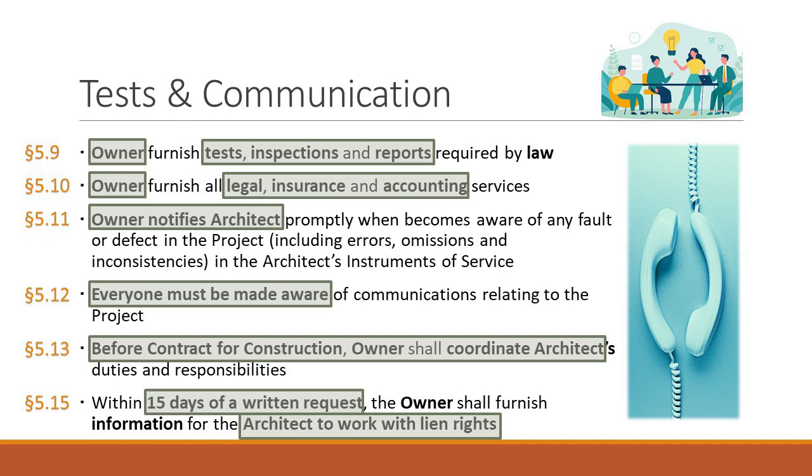The same project that I had this meeting with yesterday, where they had the directors meeting last week about this incentive bonus, the architect had been left out of the loop in some of the communications because the contractor and the owner wanted to move faster. And it was important to bring the architect in, but the owner wanted to still keep moving because the architect itself was moving slowly. So this provision allowed the process to keep moving, the project to continue to stay on schedule, and it was not based on staffing or otherwise. As long as everybody got the communications, it went further.